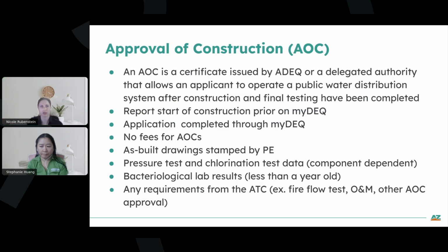So one of the changes with MyDEQ for this process is that before the AOC application can be submitted on MyDEQ, the applicant must report the start of construction date on MyDEQ. So that's a new step that the process now requires. But once you've reported that construction start date, it's very quick and simple to do. Then you can go ahead and, once you're ready, submit your AOC application.